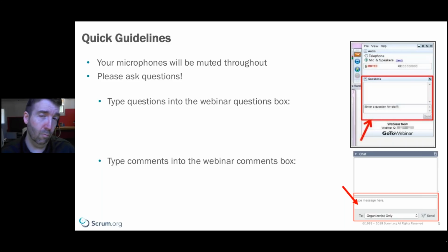I would look and want to make sure you have all the skills in the team necessary to deliver a done increment, because if you don't, those dependencies are going to create a need on the development team members' part to extend the sprint length. So as a long-term thing, you want to think about technical practices, and not just technical practices, but attitudes and understanding about architecture and design. You also want to look at the state of your requirements when you're ingesting them. We don't want big upfront design, but we certainly want requirements that are well understood enough so that we don't spend a lot of time during the sprint unnecessarily on that. So long-term, technical practices helping the development team get faster.